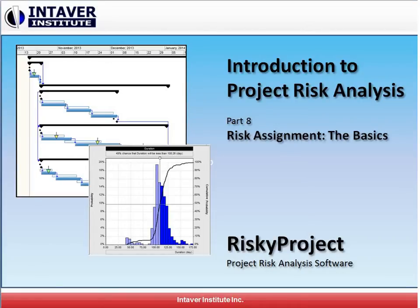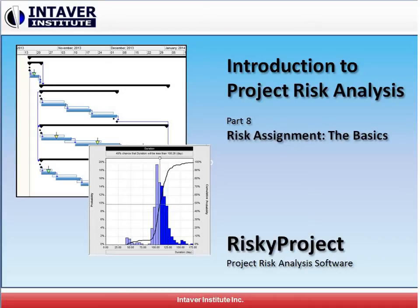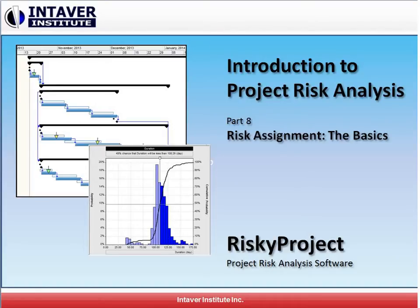In this video, we're going to take a quick look at how we can assign risks from our risk register to our project. You may have heard it as risk events, critical risks, risk drivers, or risk factors. But it's basically taking the probability and impact of a risk and assigning it either to the project schedule, costs, and also resources.